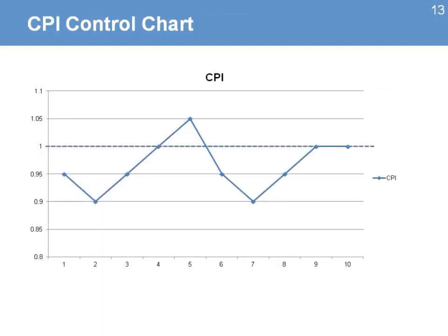CPI is an important tool. You can also graph it, and as you start making progress on each of your reporting periods, you can use it to track how the CPI is moving across the project. And from there, you can identify the moments when your CPI is way below zero, right here and here, and those are the warning signs that demand immediate attention to identify why we're having problems, why the project is costing us more, or why we're having the delays that are causing that problem.